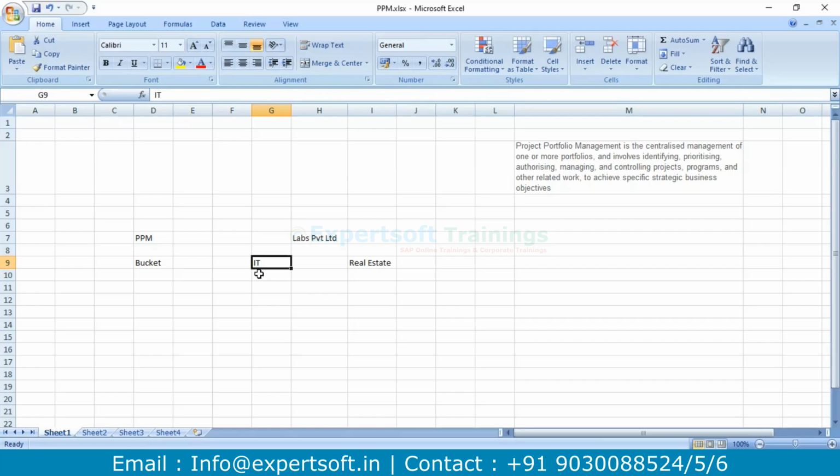Under that you can create either C projects or PS projects. The PS projects you cannot create directly under the investment projects. For that you need at least one item. Under the item you create either PS projects or maybe C projects.